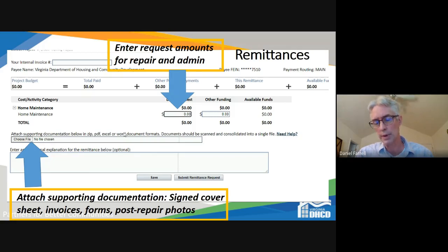So we kind of want to take care of that on the front end. We're already having some back and forth with Steve on a project. So it may be something where, if you're asking the electrician, for example, to go back and re-estimate the job for us, you wait until you have that estimate, and we sort of know what the full cost of the job is before you do the setup.